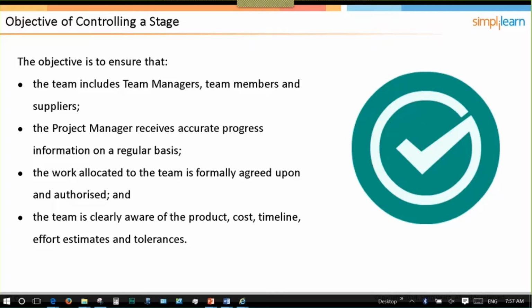Excellent conversation, and very helpful, I think, in terms of helping identify how we could apply PRINCE2 under both. Did you discuss how technical stages overlap the management stages in your previous sessions? Because that discussion was a perfect example of how that works. In Agile, your technical stages are quite short, so you might have several of them being addressed in a management stage, whereas in Waterfall, you may have something like the design technical stage being stretched across multiple management stages, but you would at least define how much of the design you expect to have finished at the end of the stage. Yes, exactly. Sometimes they do evolve day to day.